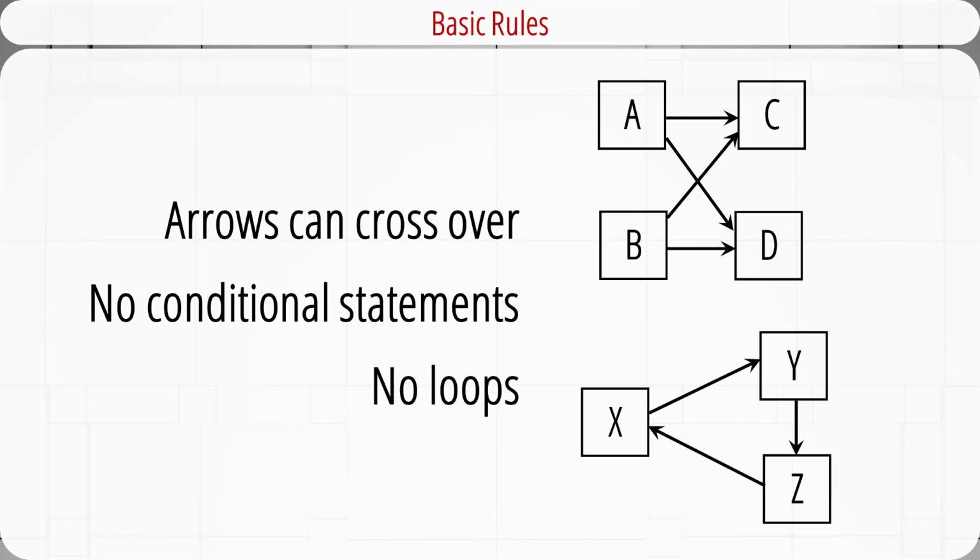Also, looping is not allowed in a project network. In the diagram at the bottom, this is an example of looping. It attempts to return to an early activity from Z to X. If this loop were allowed, this path would perpetually repeat itself and the project may never end. Many computer programs catch this type of logic error.